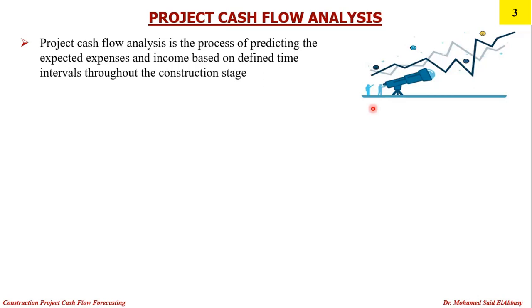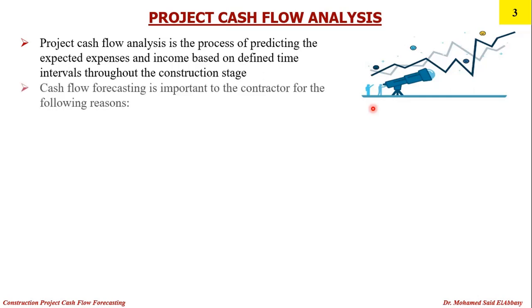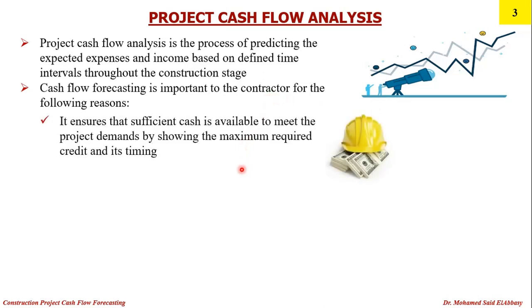But the main question here is not how do we develop this cash flow profile and how to estimate the numbers. Well, this is important, and we're going to see in detail how we do that. But we need also to understand why we do that. Why is it important to forecast the cash flow of our project, specifically from the contractor's perspective? The first thing is that it ensures that sufficient cash is available to meet the project demands by showing the maximum required credit and its timing.